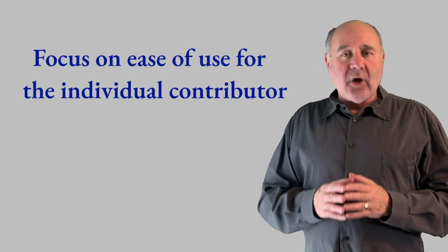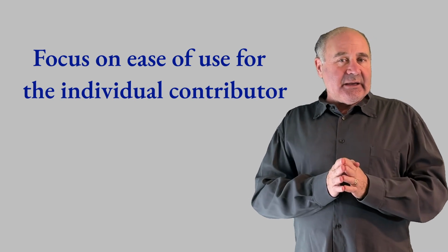There are two personas to consider: the PM and the individual contributor, or IC. Focus on ease of use for the IC. It's okay if it's complicated for the handful of power users who are well-trained and understand the importance of the tool. But for the ICs, if it's not easy to use, they just won't use it. I once worked at a small company, and every week our numbers were off because one person refused to use the tool. He knew that he wouldn't get fired over it, and no amount of social pressure would budge him.